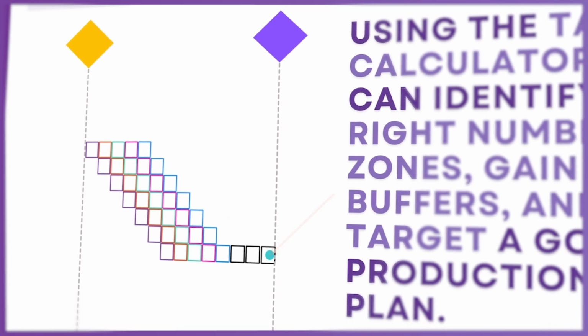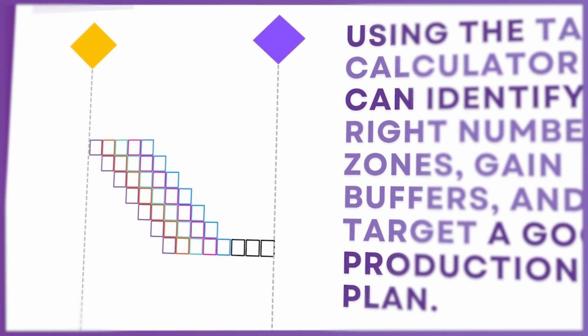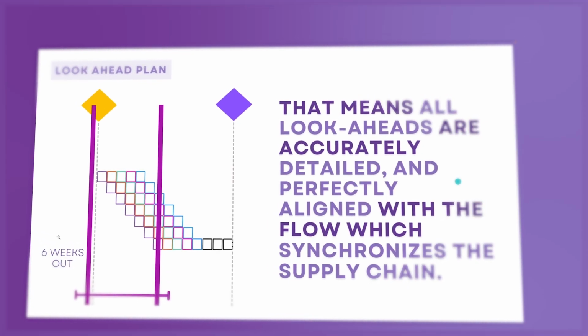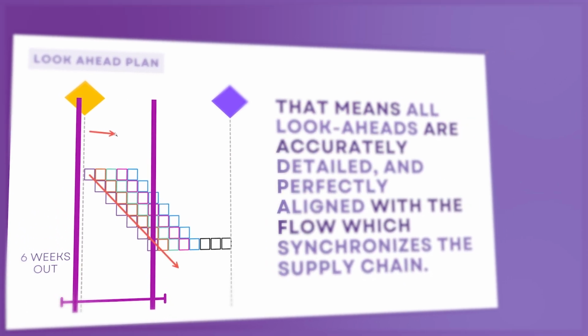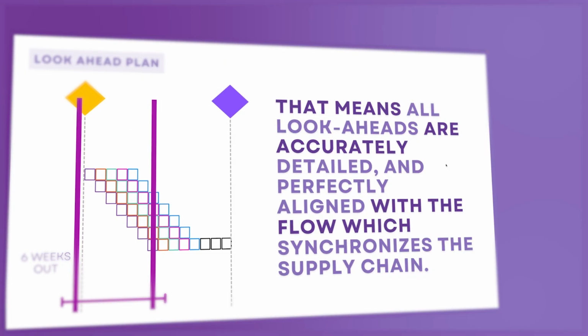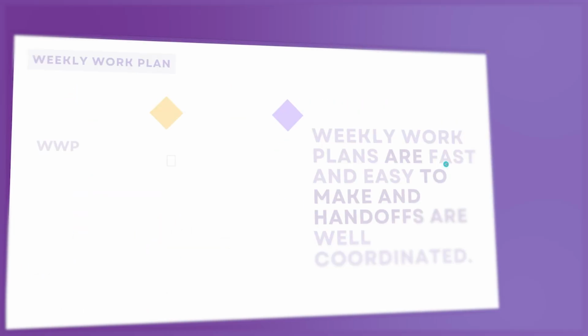That becomes your production plan, and the biggest thing is you gain buffers. Every production plan should have buffers. And then from there, you easily have what I want to point out is a flowable schedule within the next 6 weeks where you can align work and make sure you're removing roadblocks. This is something that's actually useful because it's on a flow and it's vertically aligned.